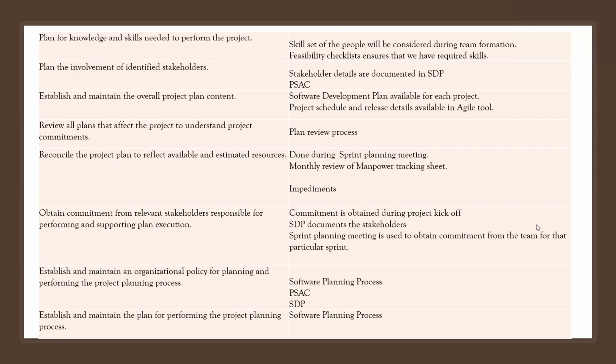So basically what the matrix shown here is whatever the methodology we have, whatever tool we have, how do we utilize it, implement it to obtain or comply with what is required for the project, be it DO-178 or CMMI. Some of the techniques that I have used are a sprint planning checklist and a sprint review checklist, so that we don't miss thinking about the risks, the impediments, and also obtaining the commitment from the stakeholders. So all perspectives of the sprint and the backlog are thought about.